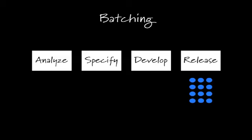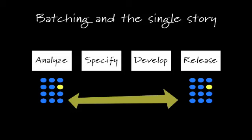And as well, when you look at the lead time for an individual piece, let's say your release takes about 6 months to get through, and you look at one feature, one functional change that has value, how long did it take? If it took 6 months, how much time was actually spent working on that feature? It's actually probably very little. Most of the time was spent waiting for other stuff to get done, and in lean terminology, that's waste.